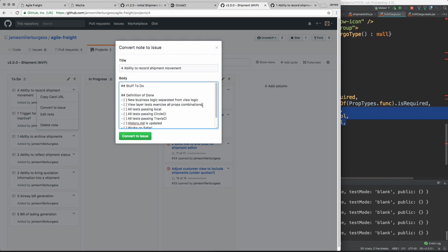it's probably accumulating kind of a bad reputation, either in the business or among the other teams, that it's not producing quality work. So it's important to revisit this, and I think that if there's a team that isn't revisiting this frequently, the Scrum Master should make sure that they bring it up on a regular basis and try to make each item in the list very tangible, clear, answerable with a yes or a no, and valuable. So I've increased my definition of done to something that I think I can achieve in the next sprint, and I may revisit it next time.